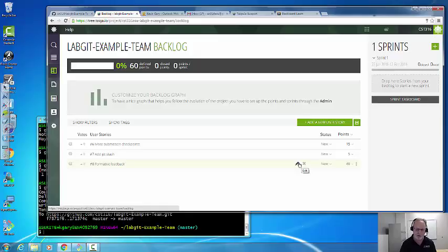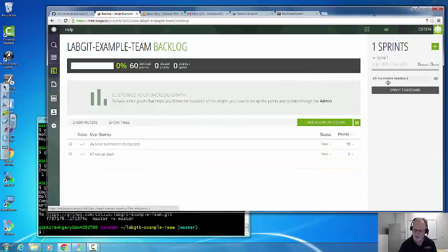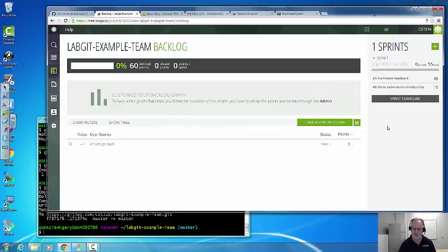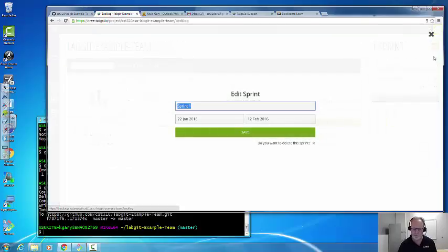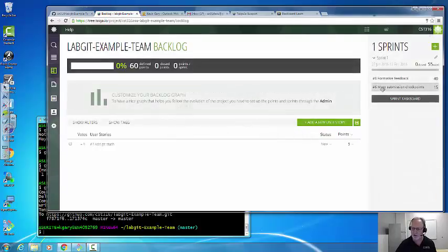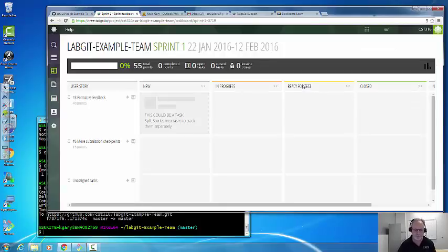So remember, as part of that planning process, we'll decide what things from the product backlog go into the sprint backlog. I'm going to say these highest value ones. So I'm going to drag that right there. There it goes. And I'm going to drag the next one, 15, and put that right there. All right. And let's say that's what I have. It tells me how many total points I have in here out of the defined points. I actually recommend, well, I'm sorry, I clicked on the edit a sprint. I recommend you go to the sprint task board.